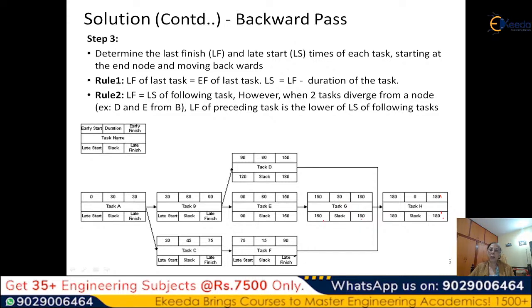Similarly, we take this 180 here. We take the 180 here. We take this 180 to this place. So these three places we have to take the 180. This part I think I have not done it. So 180 we bring here. Since 180 minus 60 is 120, you get 120 here. And again 150 minus 60 is 90 here.